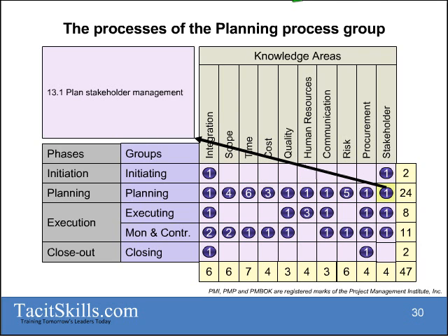As far as my stakeholders are concerned, I need a stakeholder management plan. And in that stakeholder management plan, I'm going to determine what the requirements for the stakeholders are. I'm also going to have in there my strategy. How am I going to move my stakeholders from where they are towards the project now to where I need them? In other words, their current position to their desired.